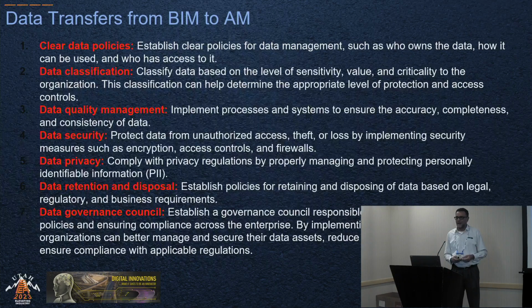Okay. And when you're thinking about these initiatives, do you have security policies in place, and do you have data privacy policies in place? Who can access what data? Because that's a big issue, right? We have it happen all the time. So I have to lock people out in our common data environments by putting rules or instructions or security policies in place to stop structural from going into, say, an architectural file and manipulating things because it works better for them. Instead of communicating and collaborating, they're monkeying around.